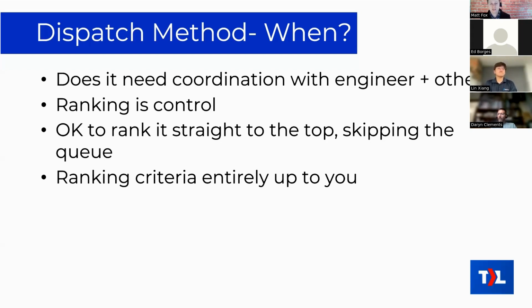That's totally permitted. This is kind of one of the benefits of Agile compared to calendar scheduling: when you rank something to the top of the list, it just pushes the next thing down, and that's all the rescheduling that needs to get done. Whereas if you're putting everything into the calendar and something needs to interrupt something else, maybe you've got to push all of the work back in the calendar.